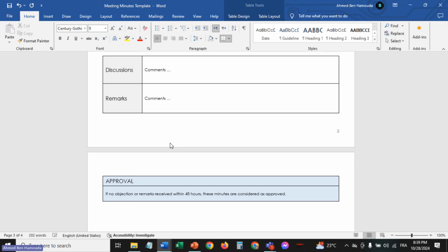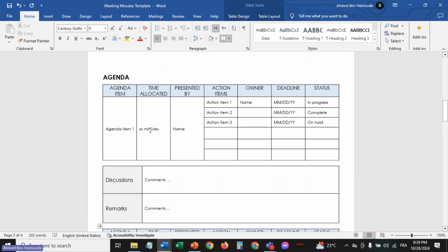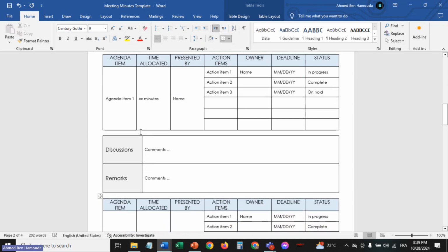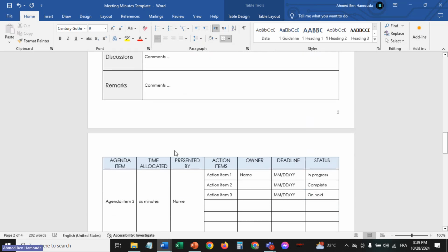I recorded what all the meeting participants were saying, and then after the meeting, I stayed in a quiet place and listened again to that meeting. I paused, took notes, and wrote down everything that was discussed. If it's an action item, a change request approval, a risk, an issue, a solution, a proposal, an agreement, whatever was discussed. And I mentioned who said it, and any remarks, etc. That really helped me in my early projects.